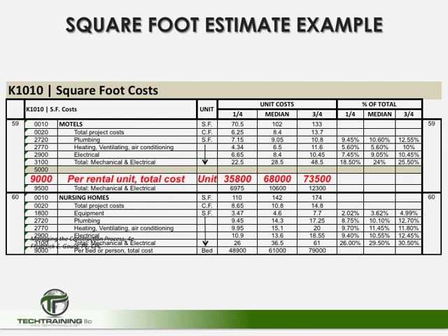The median cost represents the cost at which 50% of the projects used to gather this data are more expensive and 50% of the projects used to gather this data are less expensive. The 3/4 value suggests a higher quality. Here we're talking about a higher quality project where only 25% of the comparable projects are more expensive.